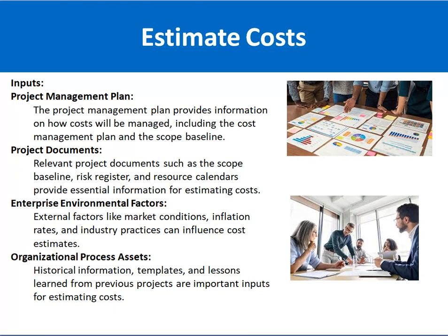The cost relates to and depends on the scope of the project. For example, if there are 5 modules required as per the scope document to deliver a project, it has some cost, for example $5,000. After a few days or months, there are a few changes in the scope, and now one more module is required. Obviously, if you increase the scope, the cost of the project will also increase. So the first input to estimate the cost is the project management plan.